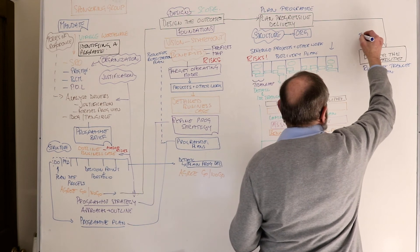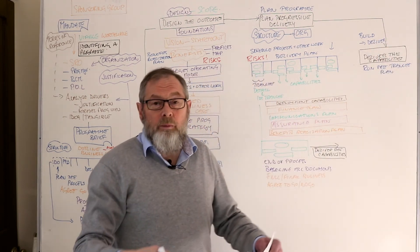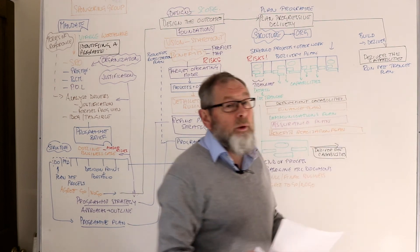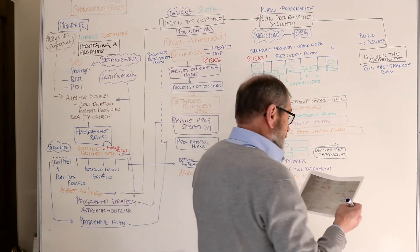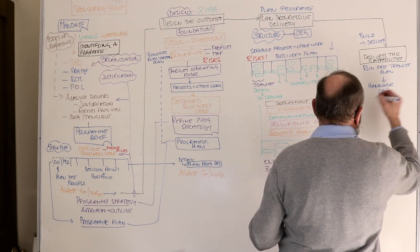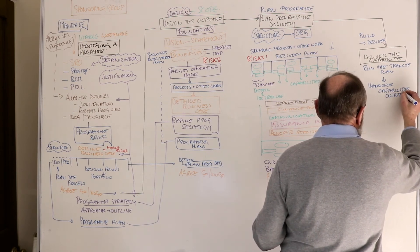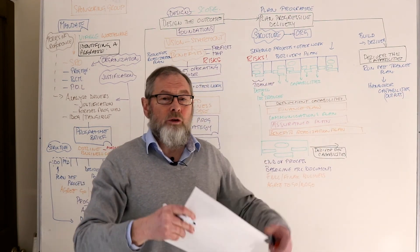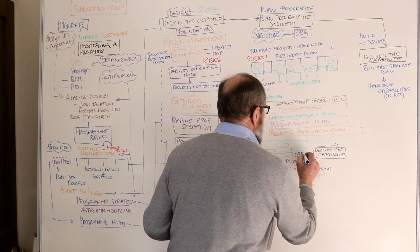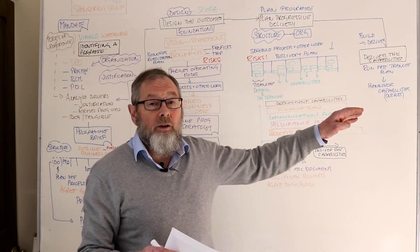The real effective thing is to build and then deliver. We run through the projects — the build of it is the objectives we say we're going to build and deliver the capabilities — and then we hand them over. Towards the end of the tranche, the BCM might be doing pre-transition operational work to get ready to receive the capabilities that you're going to hand over at the end of that particular process.